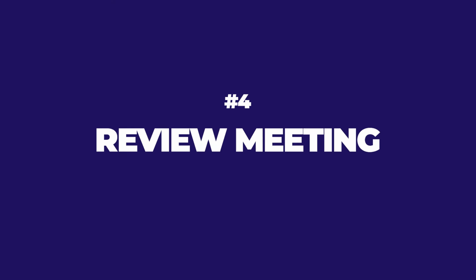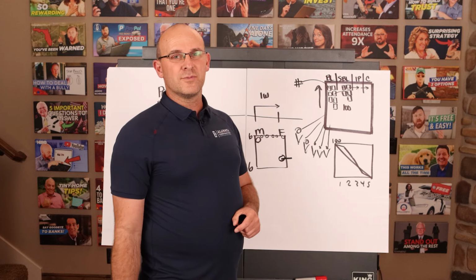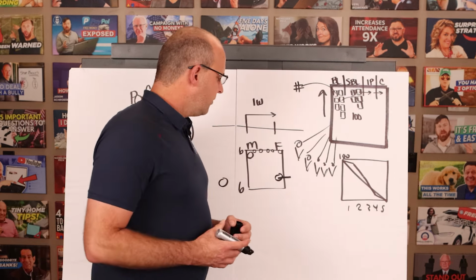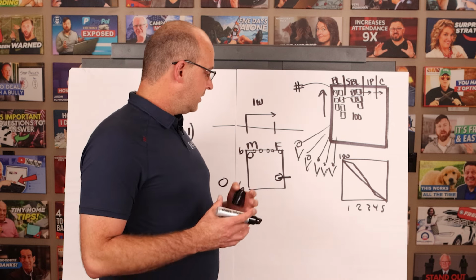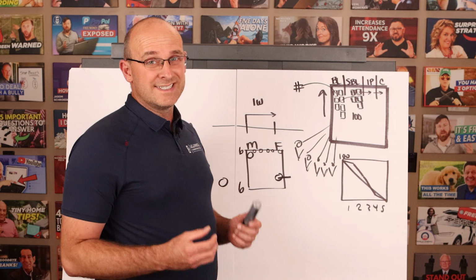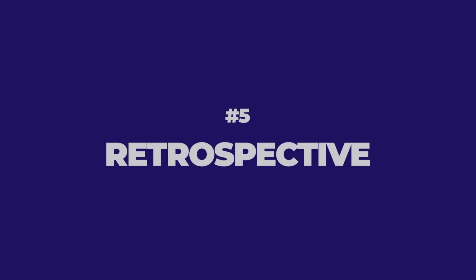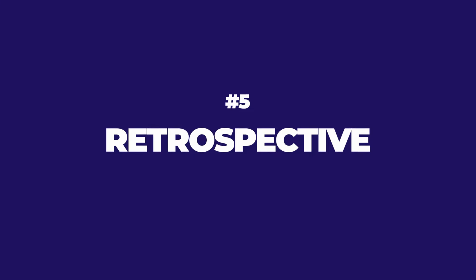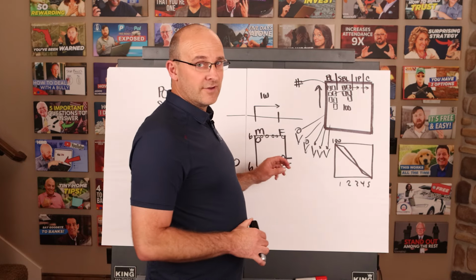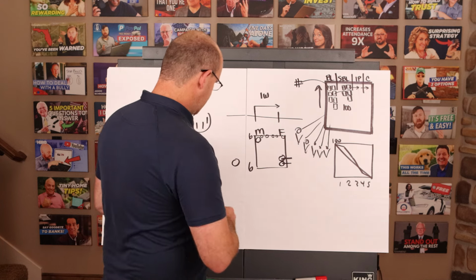The fourth is the sprint review. At the end of the week, this is where you review how much of the work you've accomplished in that week, and you track your capacity, whether you're on track to actually deliver the product, the team's performance, right? You really see, are we on track from a product standpoint? And then you go into the retrospective, which is, how did we do? Was that fun? How could we improve? What could we do better? So you're reviewing the product, and then you're having a retrospective on how well you're working as a team. So that's how the cycle goes.